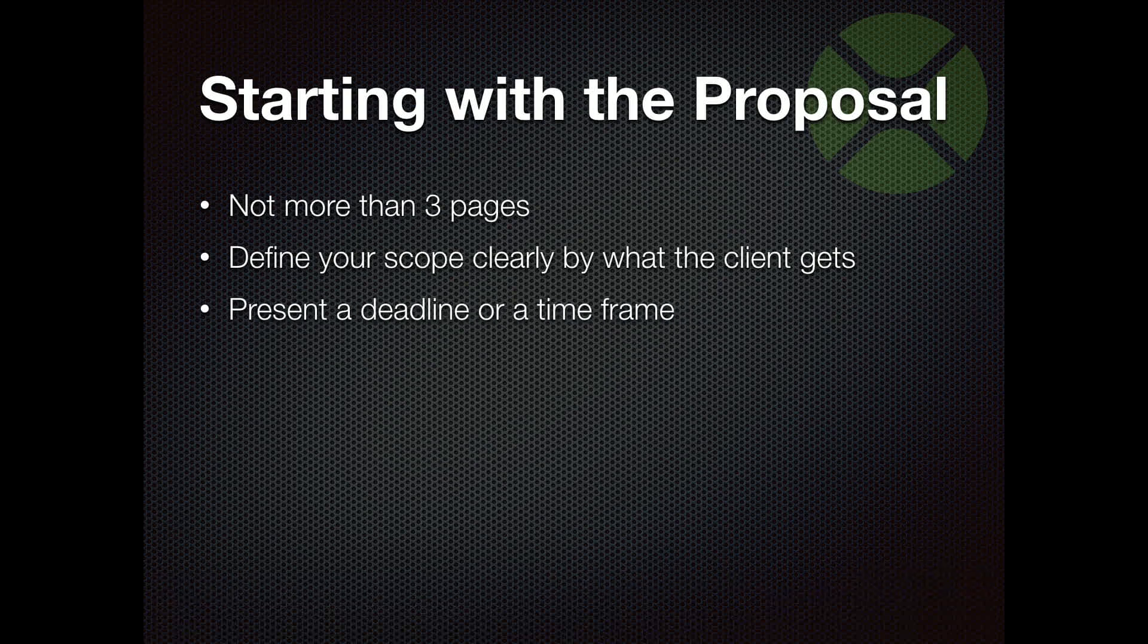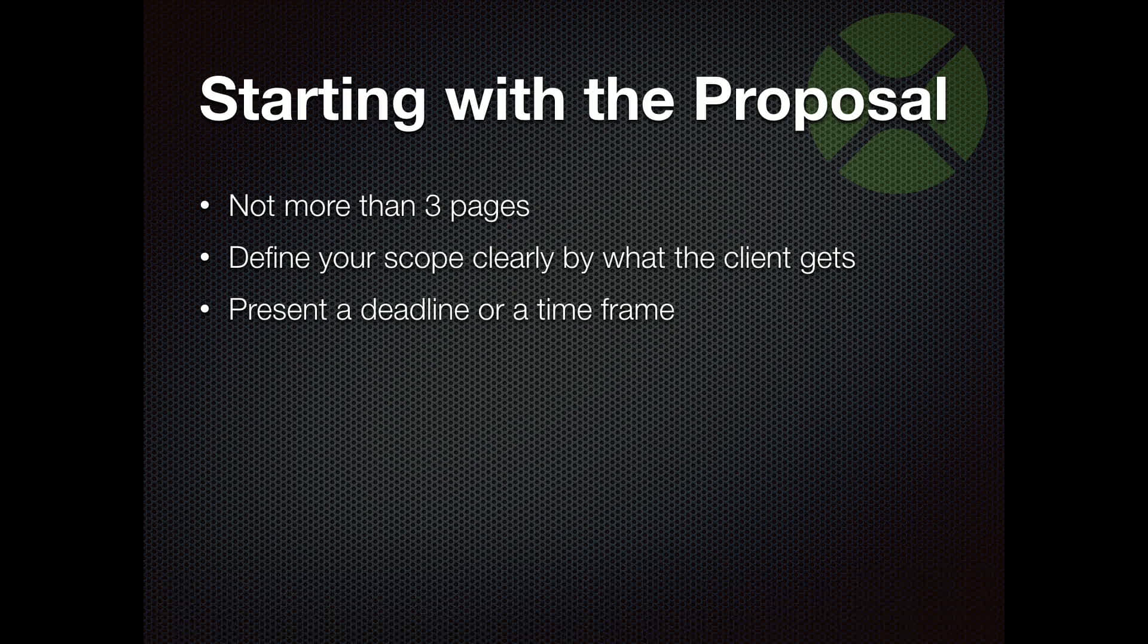Other thing you want to make sure is that you're presenting a timeline or a deadline in that proposal. I know sometimes it's hard to set a due date if you don't know when they're going to sign the proposal. So put an expiration date on your proposal. That also drives the sales process to get them to actually sign it.